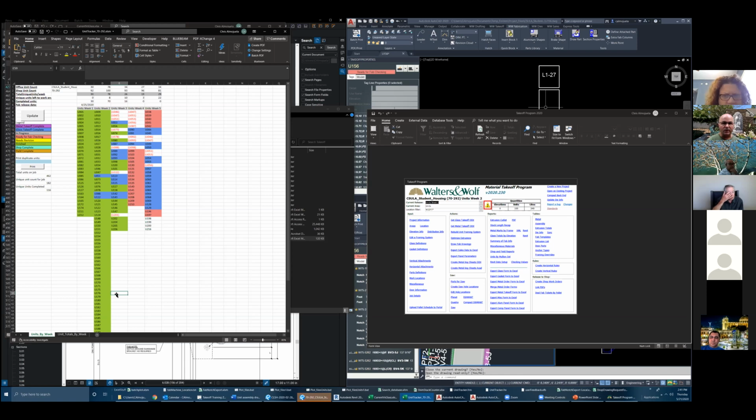Usually by the time we release our fab tickets, we're 4 to 5 weeks before the shop starts. If we keep a normal week-to-week pace, then you will usually get some feedback from the shop by the time we're done releasing the units. So if they're coming across any challenges, then we can still react and make some adjustments if necessary.